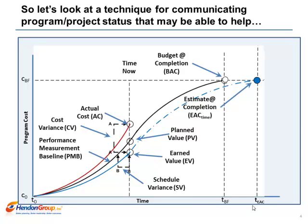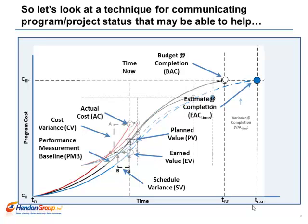Remember, budget at completion will change throughout the change control process, so remember to keep budget at completion updated with approved changes, scope additions, subtractions, etc.